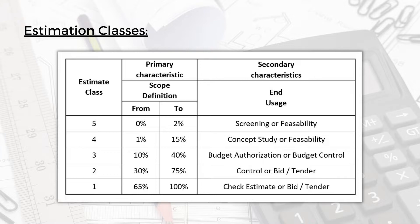The secondary characteristics are the end use, the methodology, the expected accuracy, and the efforts required for preparation. When we take a closer look: for class 5, the scope definition will be between 0% to 2% — we don't have the scope defined yet — and this class can be used for screening or feasibility. Class 4 has scope definition between 1% to 15%, used for concept study or feasibility. Class 3 has scope definition 10% to 40%, used for budget authorization or budget control. And class 2 has scope definition between 30% to 75%, used for control, bid, or tender.